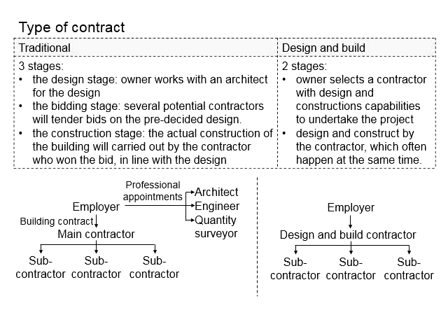There are a lot of works that need to be subbed to other contractors. The subcontractor will be fully under the responsibility of the main contractor, and the main contractor will have to manage all the subcontractors. As far as the employer is concerned, everything is to be referred to the main contractor, as the building contract is between the employer and the main contractor.